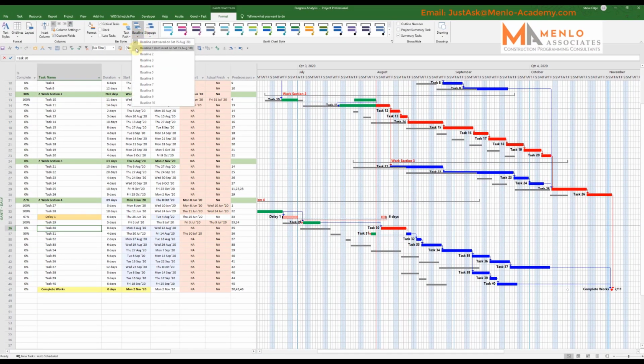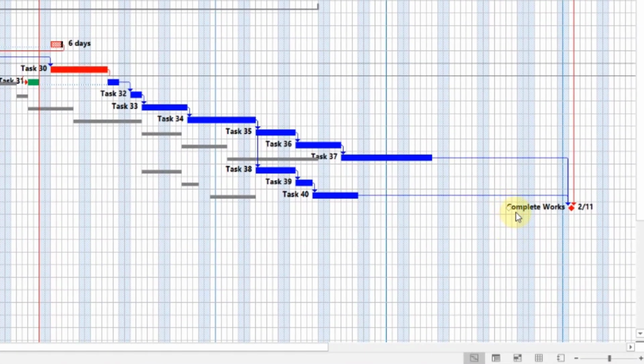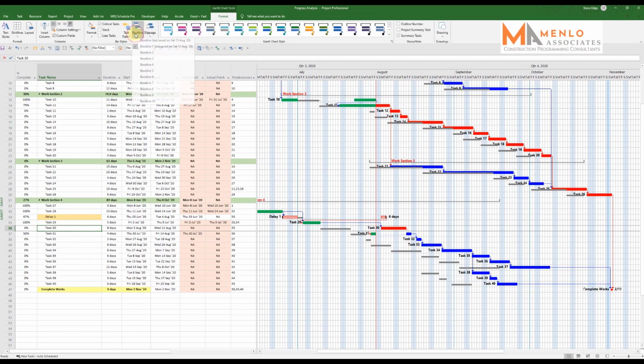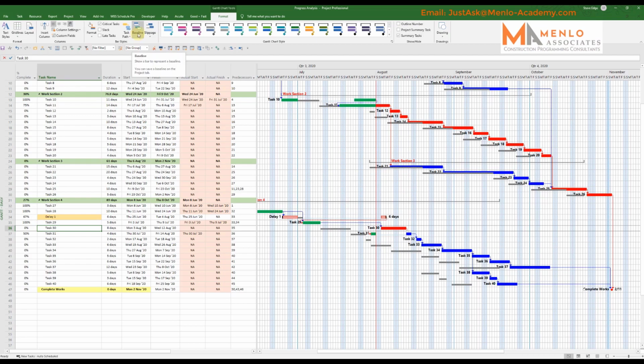Last month's baseline is this one, and my finish date at that point, I just hover over this, it should light up for me, and it's sod's law it isn't doing so. But you can see now how things have changed there. That was the original, this is now first, and it's recalculating. So at this point, I would save a new baseline, save the program, and this will become my revision C, and I'll report on the changes since last month.